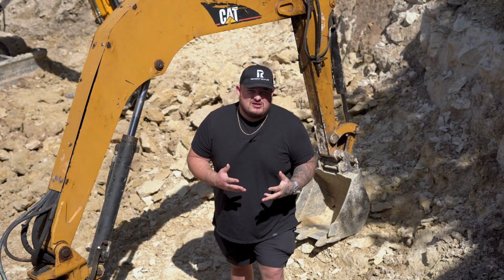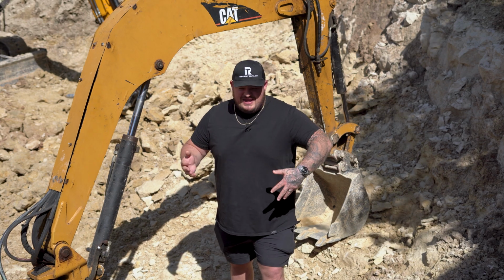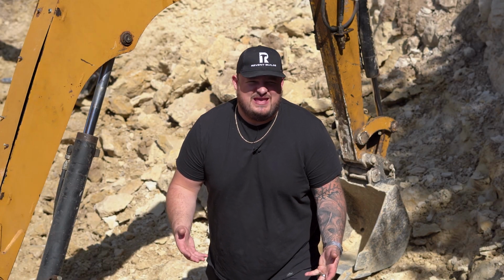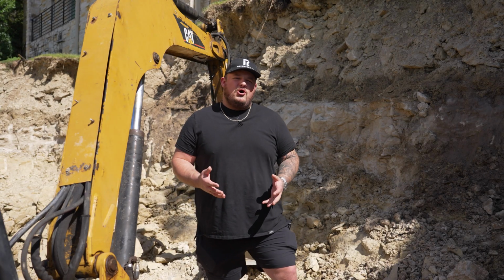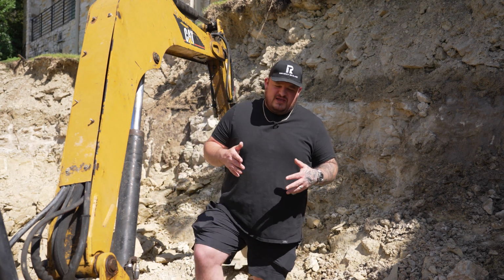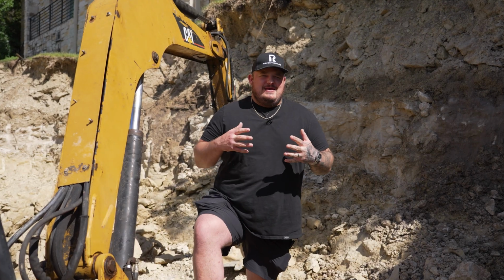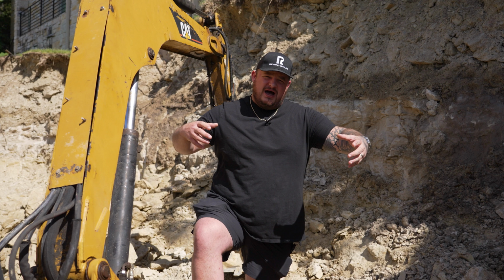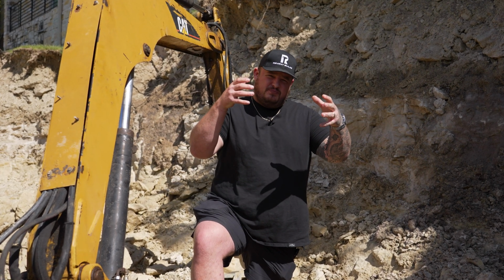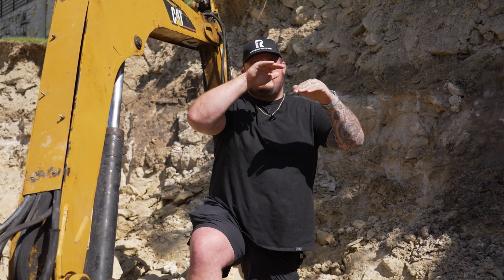I literally thought this whole job was gonna come toppling down, my career was gonna end, and I was gonna fall into an everlasting pit forever and ever. But there is always a path forward. I got with my framers, we figured out that we could, nothing is ever simple, take out the posts on the bottom, put in temporary support posts, use jacks to lower this porch by 2 inches to get the slope that we needed.